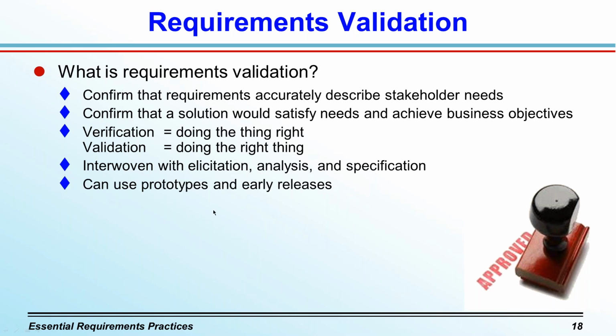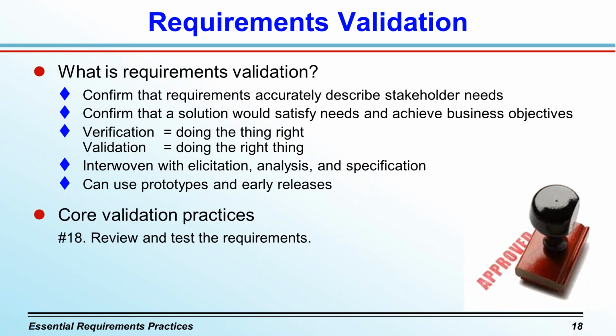Prototypes and early releases of your solution, or even delivering the full solution, those are ways to validate with customers whether or not you're building the correct solution. But those can be rather expensive activities, and you don't get much feedback until you've actually built something. So a core practice for ongoing requirements validation involves a combination of reviewing requirements and testing them before you have any code.